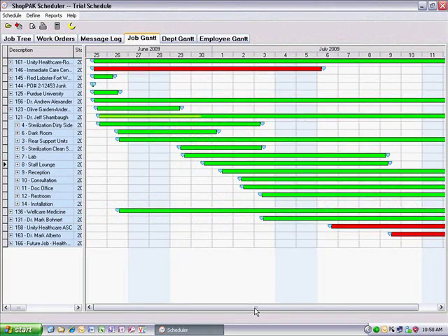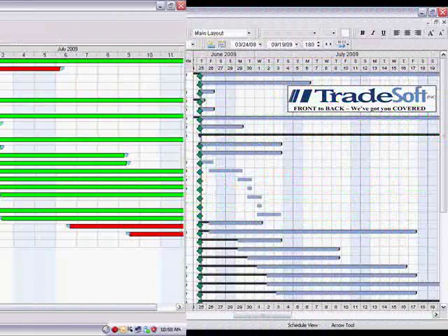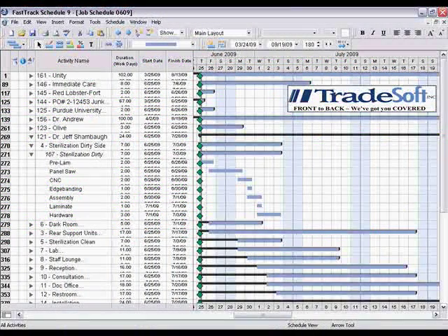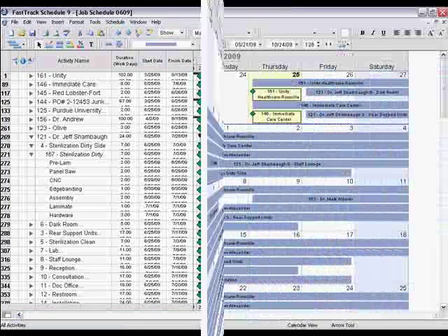You can export scheduling information from the scheduler to either AEC Software's Fast Track scheduling package or to a spreadsheet like Microsoft's Excel. Reasons you might want to export scheduling data include: you need more bells and whistles than we provide when generating Gantt charts. For example, Fast Track allows you to add milestones, notes, tasks, and graphics to their Gantt chart.